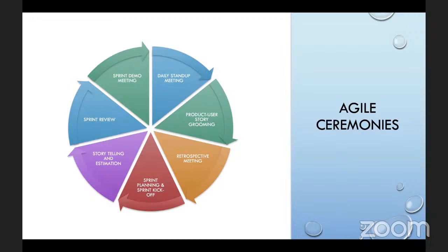This is not the same as the sprint retrospective. Guys, I want you to take note very well. This is not the same as the sprint retrospective, right? Sprint review is a meeting that happens at the end of the sprint cycle, and then members will come on, we inspect what was done during the last sprint and update the product backlog, and even demo the feature to the stakeholders that are on the call as well.